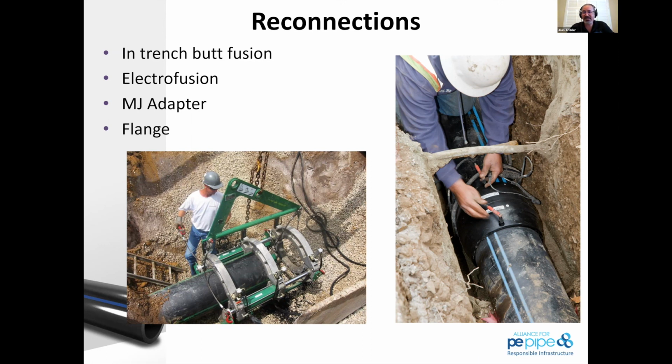Again, this is atypical. This is that very large pipe, very specific application. Most pipe bursting contractors out there would not own this type of equipment unless it was a very large job, but there are equipment manufacturers that would manufacture this equipment, have it available as a large rental fleet, which actually happens more often than not on specialty pipe bursting jobs.